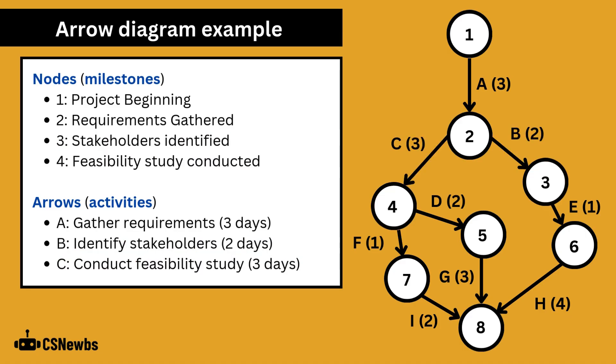The arrow diagram is good at showing which activities and milestones are dependent on others. For example we can't reach milestone 7 until we have reached milestones 1, 2 and 4 and the activities between those have been completed.